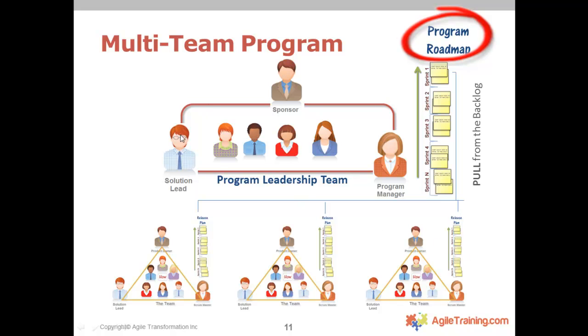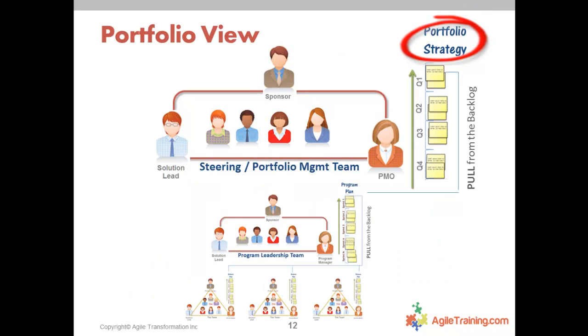And this is also just an emphasis that if you do have a program, you need to have a program leadership team, in some cases referred to as Scrum of Scrums in Agile, which is a group of individuals made up of the team members. Some of the product owner, the Scrum Master, the technical leads come back together again here, meet with the sponsor, and talk about how the program is going in terms of progress. And you could also actually put up a physical Kanban wall to show progress at that level.